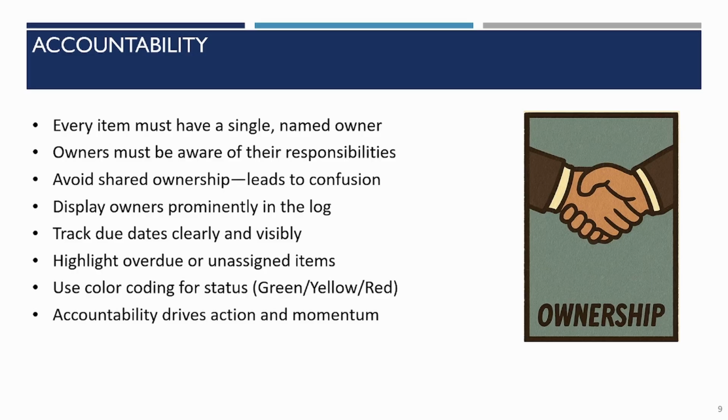A lot of times with RAID logs, I like only putting the names of the team members that I work with, even if they're not ultimately the person who's doing the thing, because that tells me who I need to follow up with, and who, maybe it's a PM that needs to run down something. I put their name on it as opposed to the person who has to do the work, so that I can sort of stay within the people that I influence.